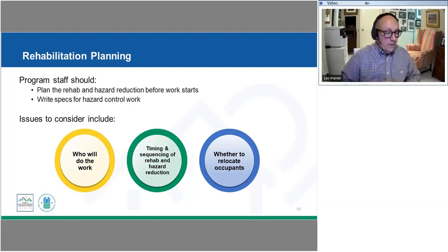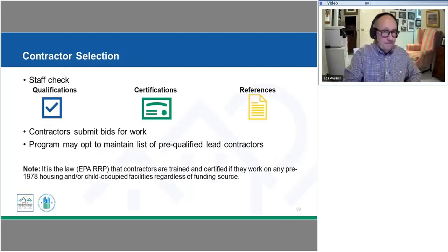And so if we could have them be required only to be out of that unit for an 8-hour workday, then we could allow them to not need to be displaced from that unit. So all of that needs to be thought through on the front end of this project and have plans, have budget, have some staffing roles laid out in advance as part of that.